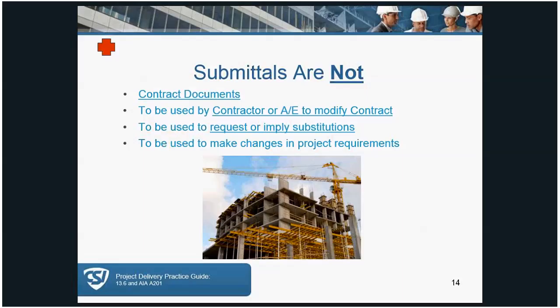Article 1.1 talks about what the contract documents are, and then specifically Article 3.12.4 says that submittals are not contract documents. So very important concept for you to understand. Next slide. Next slide. All right. So the next slide.